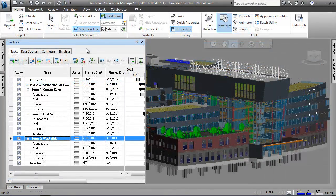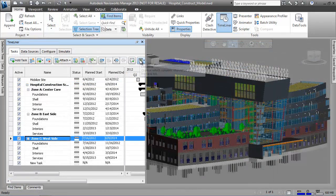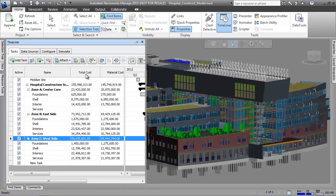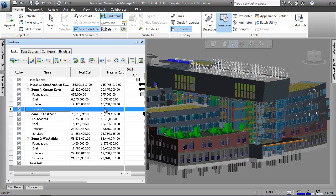Further enhancing the analysis capabilities, we can also attach costs to the tasks and create a cost-loaded schedule.